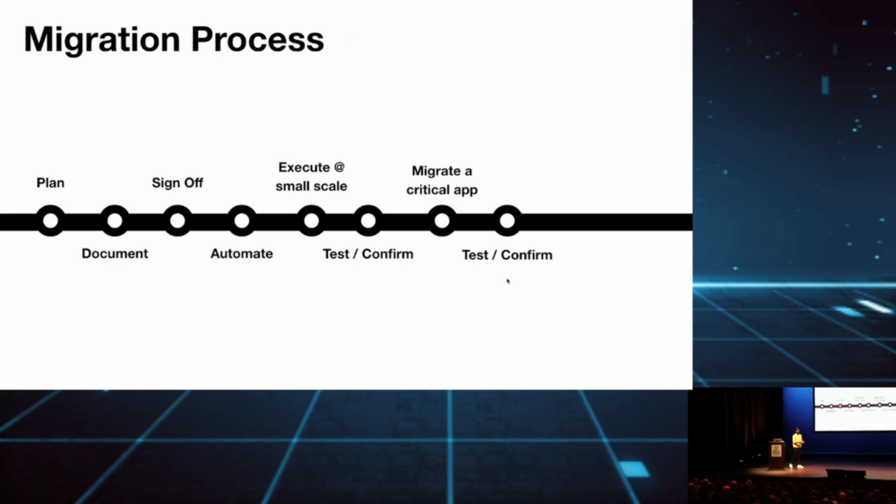Once we found success, or once we figured out what is missing and how we can fix the automation script, whatever learning comes from this, we put it back into the automation script and rerun everything together. Until we are very confident that everything works, we continue doing this. And finally, we completed the migration. Then we released the script to the entire company and asked everybody to migrate on top of it.